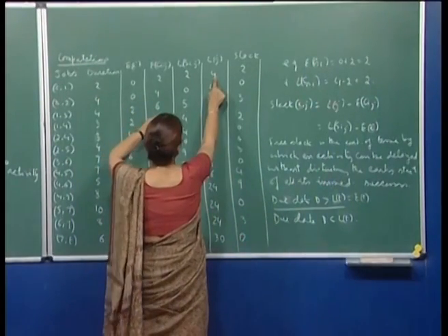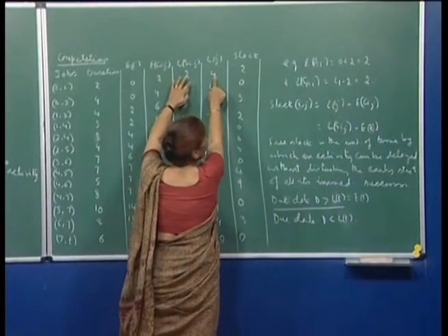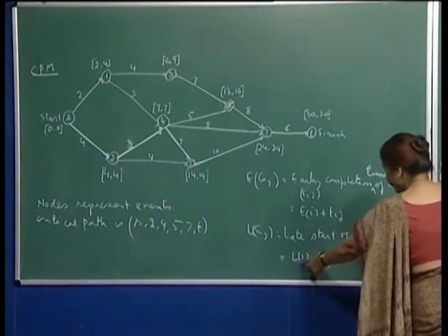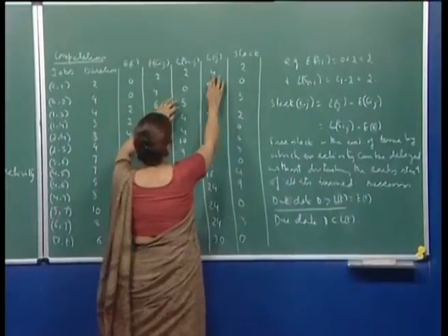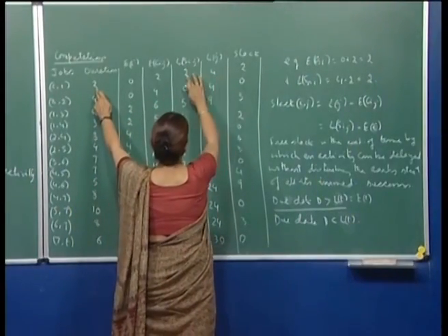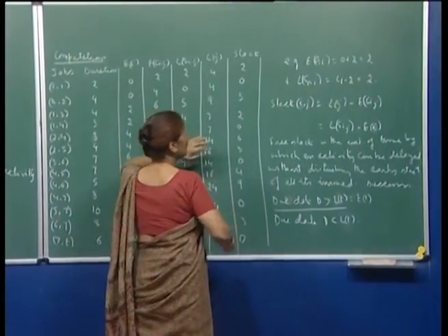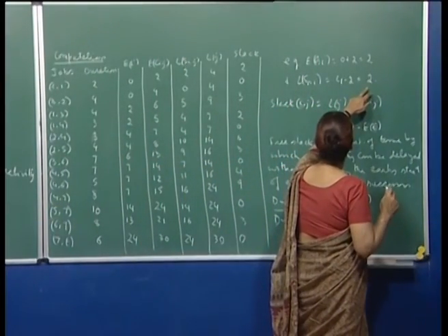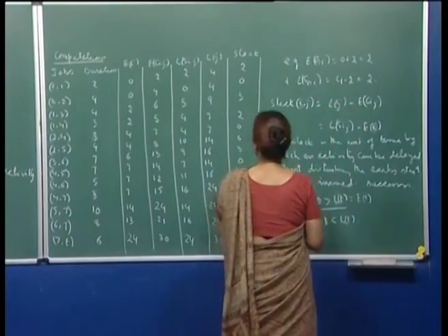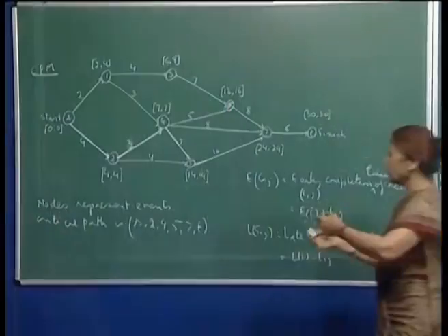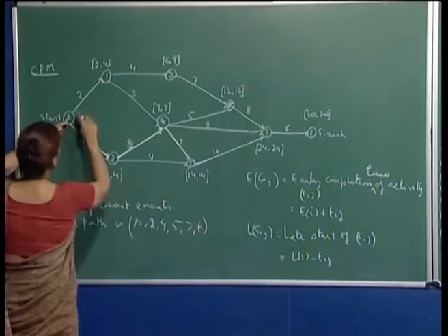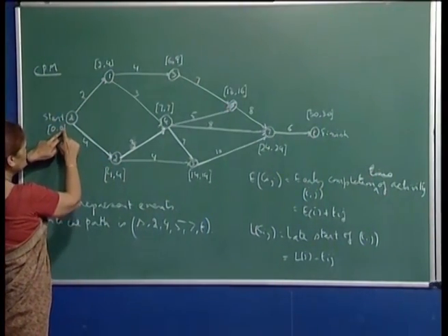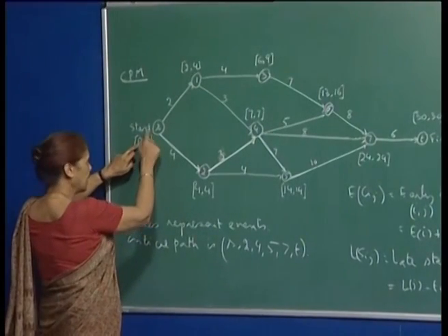So, L1 is 4, and this minus 2, that is what I am defining, Lj minus Tij, so this would be 4 minus 2, which will be 2. Therefore, the activity S1 can actually begin after the second day. See, here for this activity S1, this number E1, the ES, is 0.